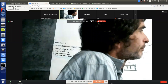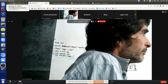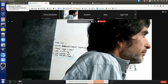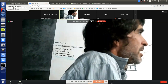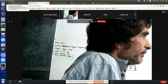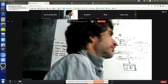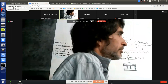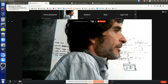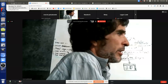I think we ran into this problem on the first day we were working. I suggest you have a dedicated team of three people. One person is always holding the tape, so they're always going to hold the tape. That's actually good. For our measurements, those people can sort of go down on it, and there's some reliability that's hard when we were switching off roles. Right, yeah, that was part of the issue. So maybe three people and no more do that part. We're kind of bottlenecked at that step.